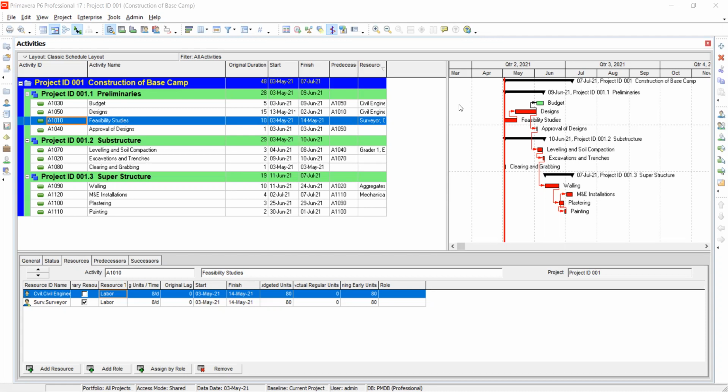So a critical activity is a type of activity in which its delay will affect the duration of the entire project. What does that mean? It means that in case you have a critical activity, you should first assign resources to those particular critical activities in order to avoid time overruns. Remember, they are very many. You may have 10 tasks, and within the 10 tasks you have like 6 tasks that are critical and others are not critical.